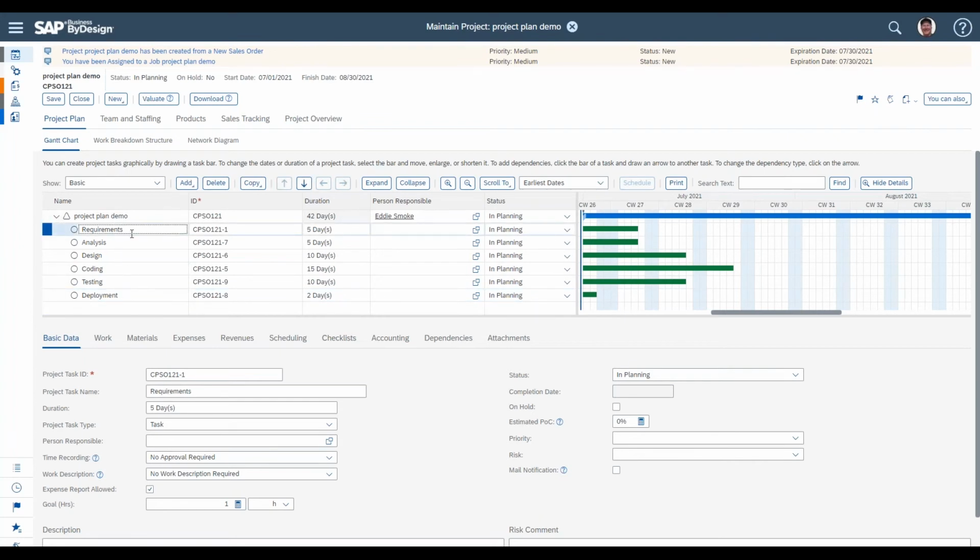Now, you can see as I've done the duration, I specified through these tasks what's going to be done. I'm specifying here the overall duration, the elapsed time of what it's going to take, but the system's assuming that it is all starting at the beginning of the project. If we don't tell the system any further, that is the assumption that it's making. It's assuming that every task defined here is going to have the same start date as the project itself.